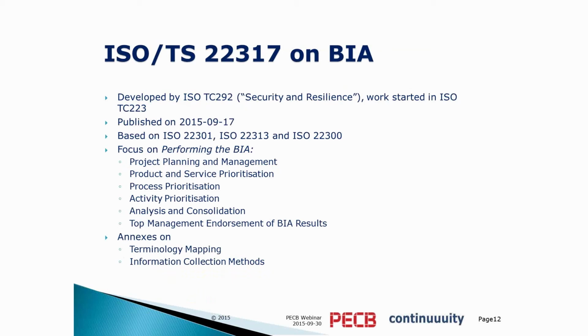So it's certainly not enough to say, okay, the maximum business interruption is 2 hours, without any justification. There must be a justification based on customer requirements, legal requirements, contractual requirements, financial impact, whatever, to really understand why certain decisions have been made when conducting the BIA.